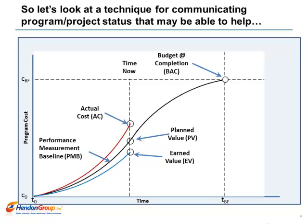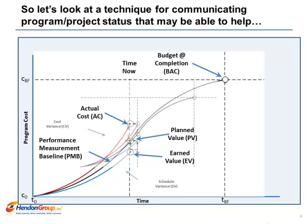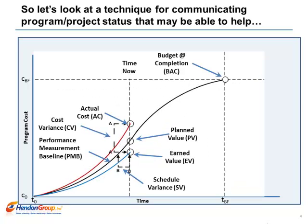From these three data points, you can calculate performance and variance. Cost variance is simply the difference between the earned value and actual cost at time now. A negative variance is over budget, a positive variance is under budget, and a zero variance is on budget.